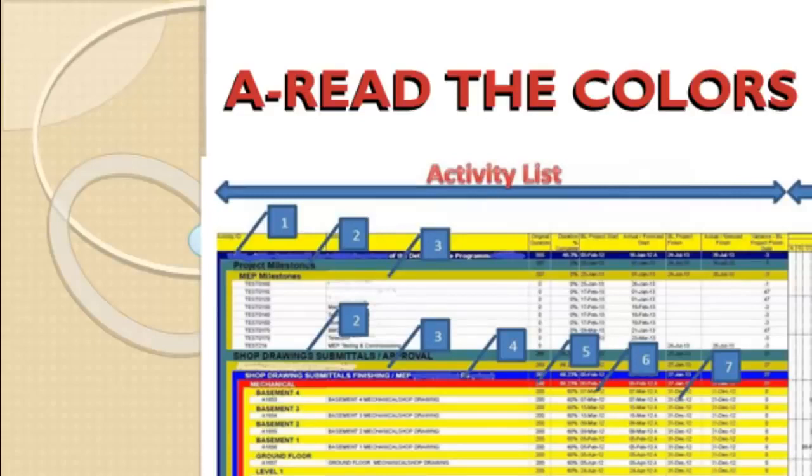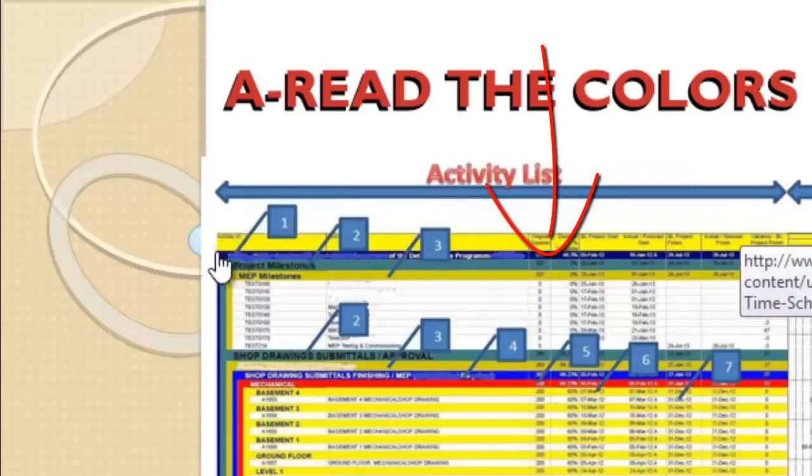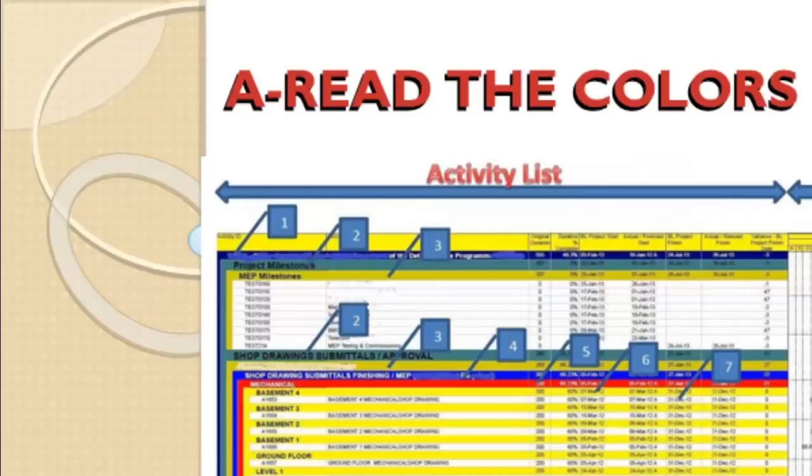For example, if you want to know the Primavera time schedule's overall duration, you should go here to root level number 1, go to the duration column here and read the duration. This will give you a summary for all the levels below, i.e. for our example, level number 1 will give you a summary for levels 2, 3, 4, 5, 6, 7, and so on.